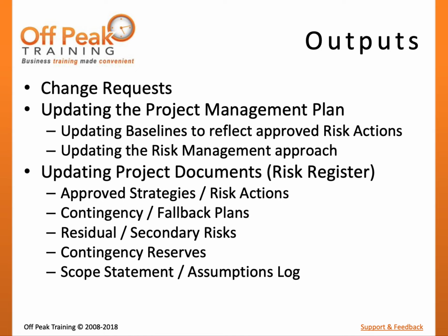Contingency plans and fallback plans both are created prior to the occurrence of the event. The implementation of a contingency plan may be based on the occurrence of a pre-event trigger or the occurrence of the risk event itself. The term fallback plan can be used to refer to a plan generated pre-event to deal with the aftermath of the occurrence of the event itself and failure of all other response strategies. It can be thought of as a plan B.